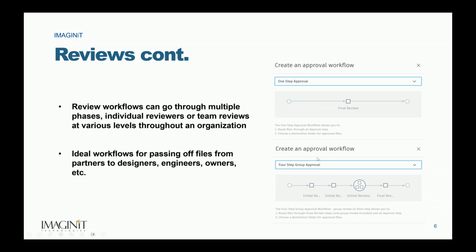When we get down into a group approval phase, let's say it bumps through a project engineer, project manager, and then an architectural team who needs to do just a quick little scan over it and double check everything. Then they'll kick it back to the project manager to give it that final approval and send it out to everybody on the project who needs it. Once it's been reviewed, those people are going to be able to see, okay, perfect, this is the exact item that I want to use. Now when I'm walking around on the field, I'm using the most up-to-date plans that I actually need to use.